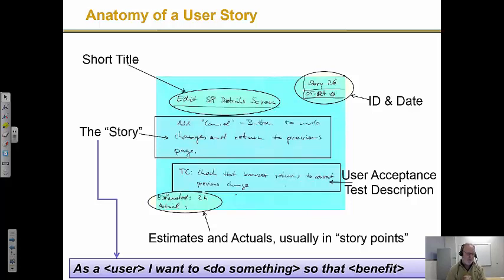So if something is twice as important as something else, then one of them I'd assign 10 story points to, another one I'd assign 5 to. There's some techniques around doing this. We will talk about some story point estimating techniques in the next sprint. We'll talk about planning poker. We're not going to do that now. For now, I want you to do kind of just what feels right.